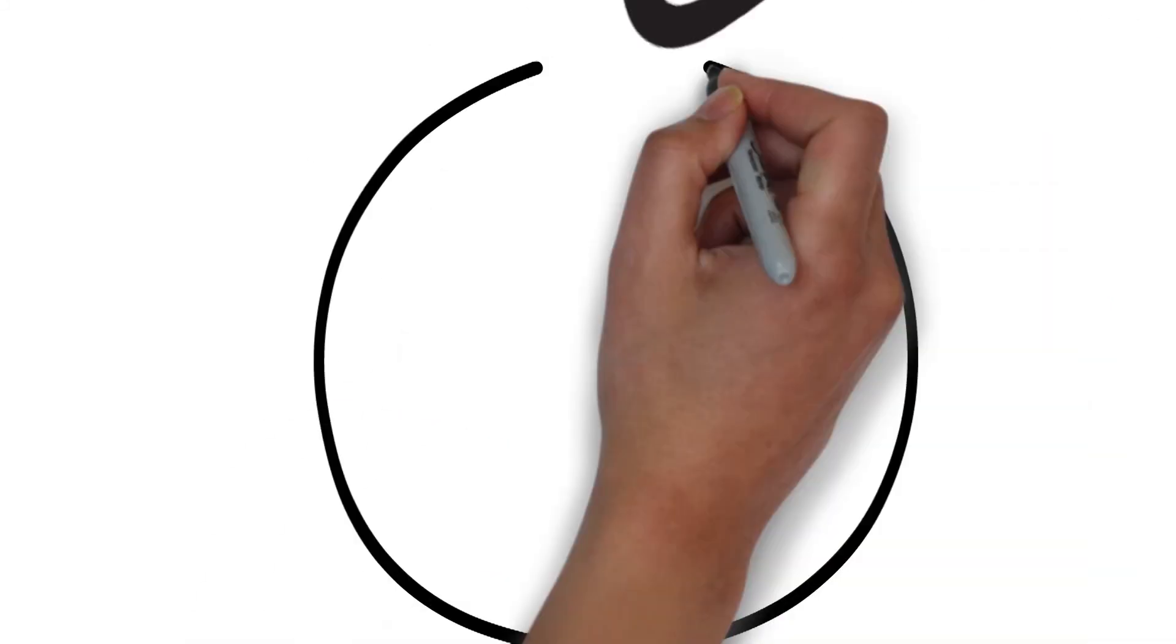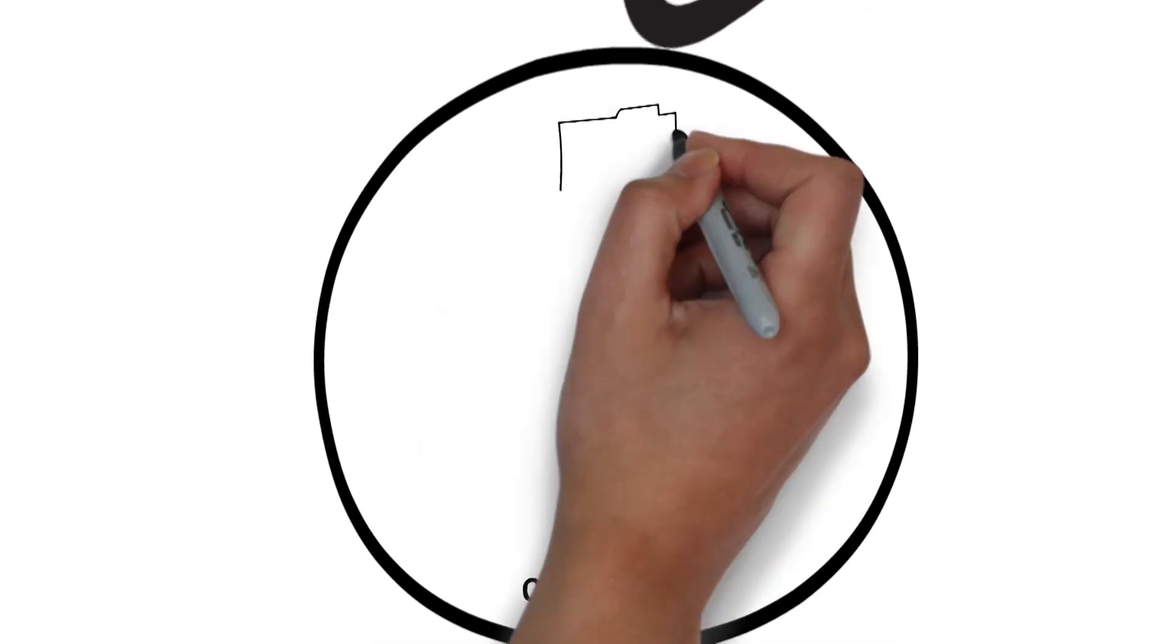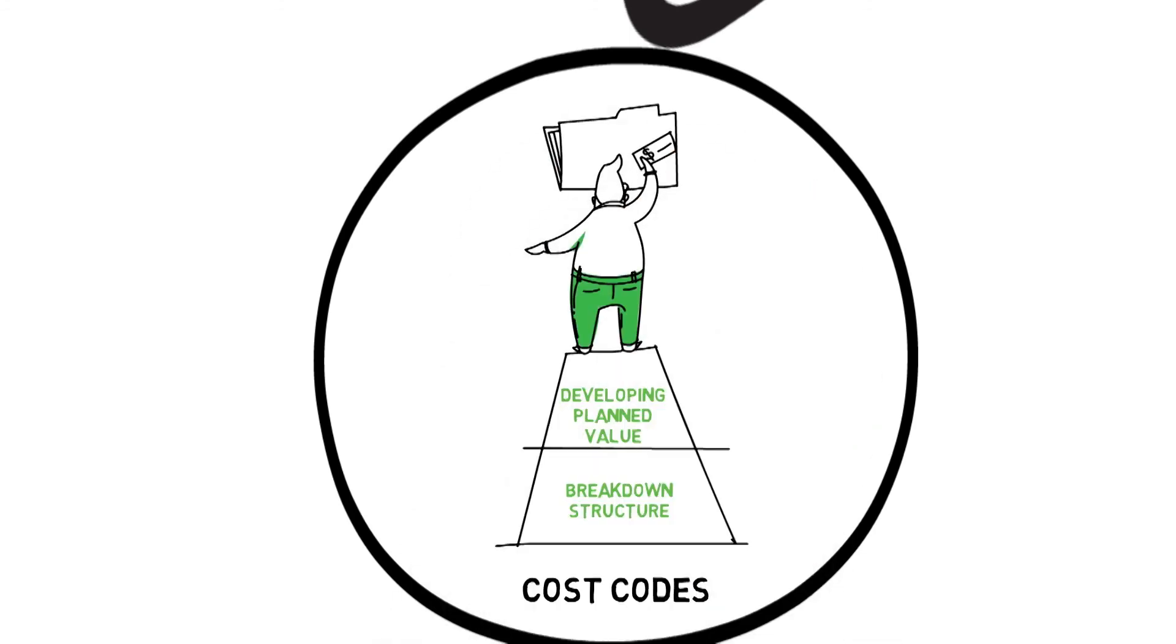With the foundation of the work breakdown structure and the process for developing planned value in place, the project controls team can now develop cost codes that capture earned value and roll-up to track cost performance at a CWP level.